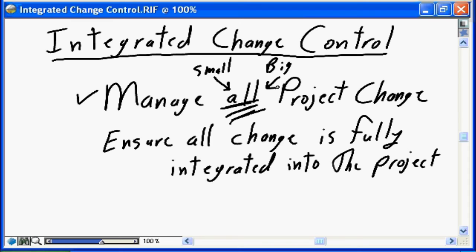If you have to change the color and the color has been approved and signed off, you must go through change control. If you have to add functionality that is not in the original scope, you need to go through change control. If you want to change anything that has been pre-approved on the project, it needs to go through change control.